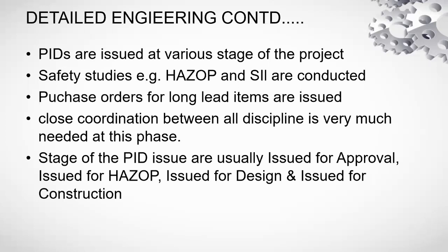Then another stage is issued for HAZOP. Then HAZOP is conducted. HAZOP closure report is carried out in this phase. This is similar to what the FEED contractor has done in the FEED stage. Most of the time, yes, the FEED contractor does a FEED stage HAZOP. In addition to that, detail engineering stage HAZOP is carried out. After that, issued for design is the stage of PNID, and the last is issued for construction.